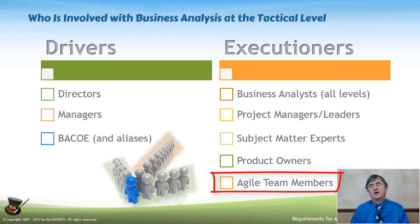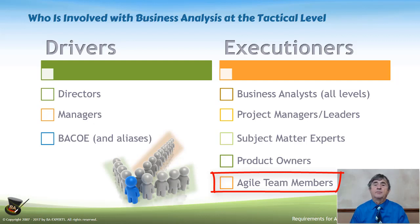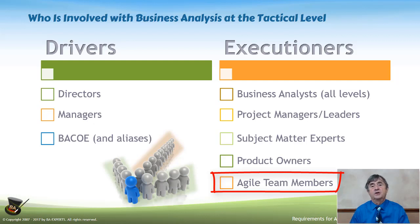In agile implementations, many organizations have moved to what is called a customer-side team — people who try to stay ahead of the agile developers by looking at the user stories coming up in the next sprint, to make sure they are ready for the developers so that developers aren't sitting around with nothing to do.